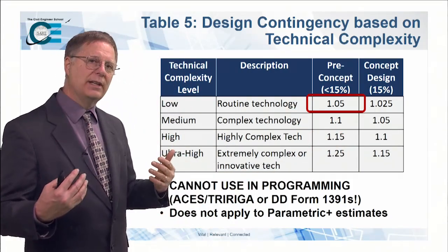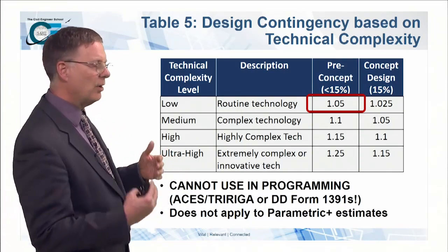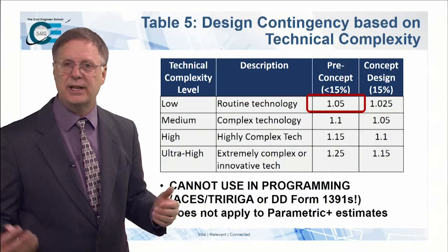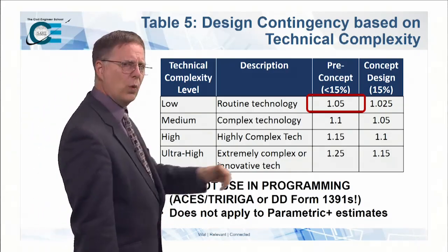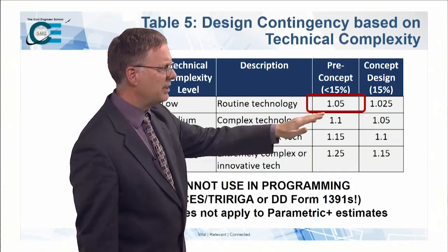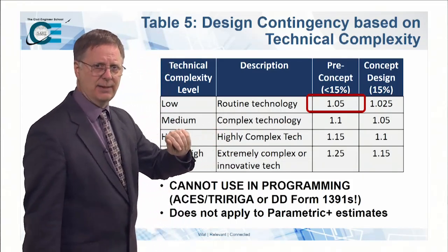So for our facility, it's a vehicle maintenance facility. We're going to call that routine because we build these things all the time, all across DoD. And we're well early in the stage of the process. So we're going to call this thing a 5% design contingency.